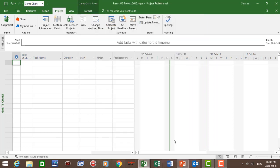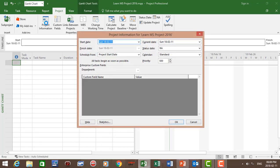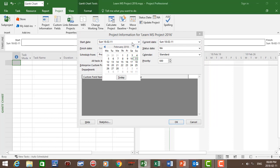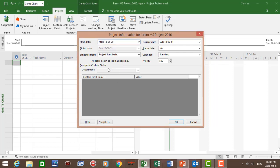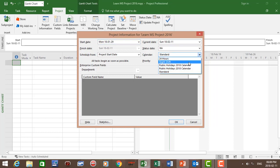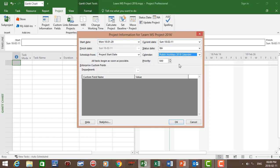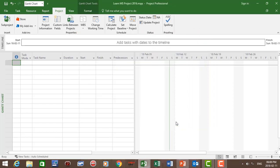Now let's set the base calendar for the project. Click on the Project tab, then Project Information. Set the project start date for the 29th of January — that's the project start date. And for our calendar, let's choose Public Holidays 2018 and click OK.